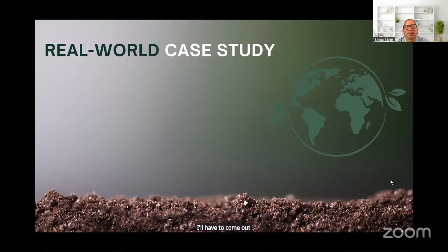Well, not all of it, but maybe up to 4 feet or so, the area that was sinking. Then we had to bring in new soil called engineered fill that could be properly compacted. And then we used a geogrid system, and then new asphalt, and that seemed to do the trick. So that was a situation where we missed getting test results early on, and the remedial fix was costly.